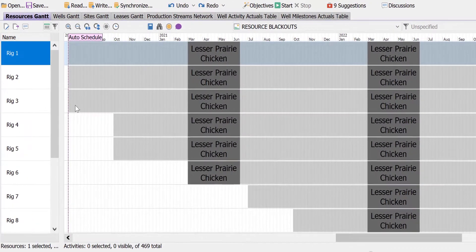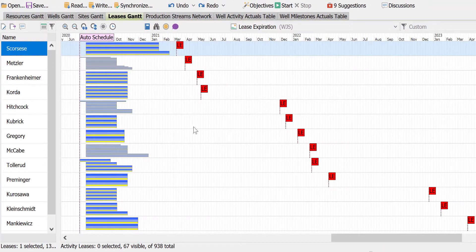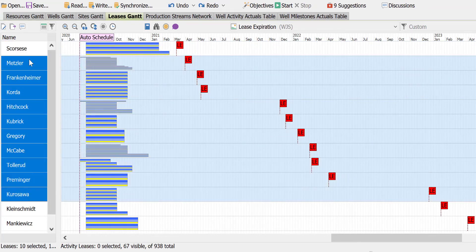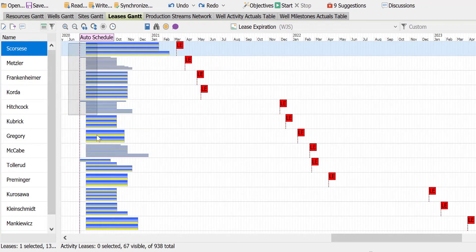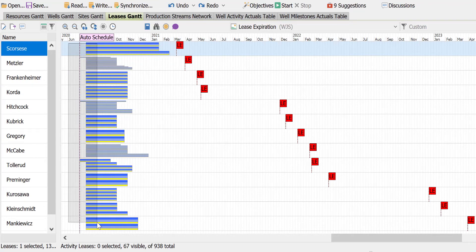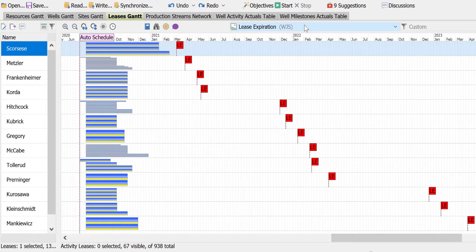Let's switch to this lease-oriented Gantt chart view. The various lease names are shown here, and here are all the drilling activities, ready to be assigned to the rigs. Now suppose that we want to build a schedule that will ensure there's at least one drilling activity within each CDD period until all inventory is drilled in the lease.